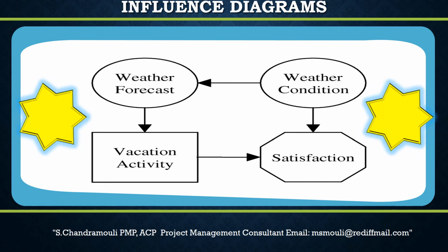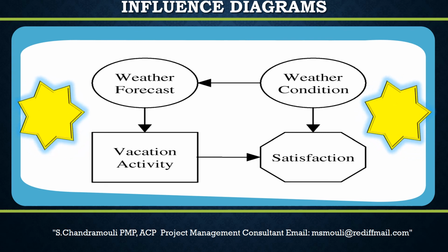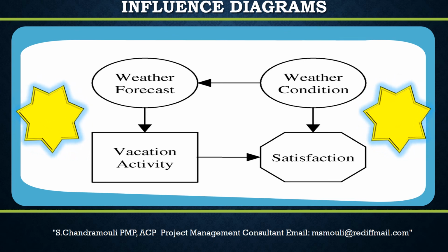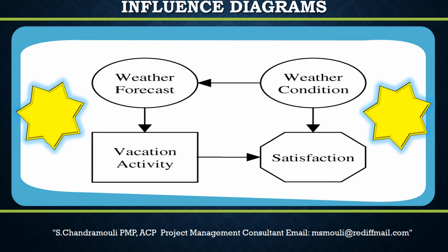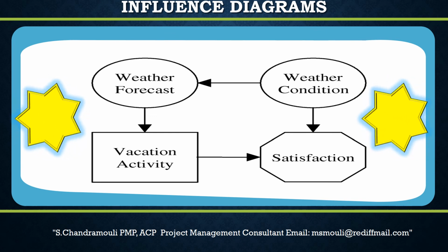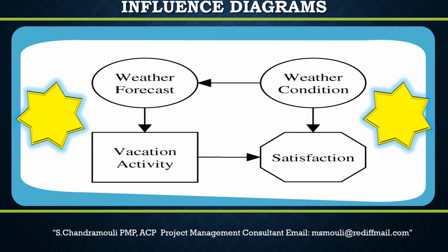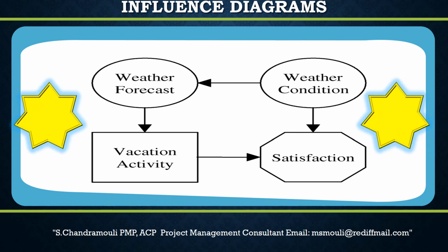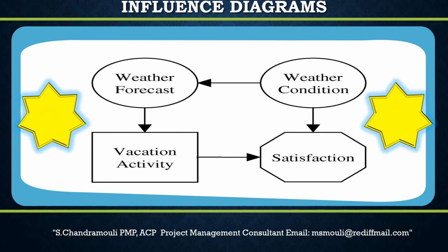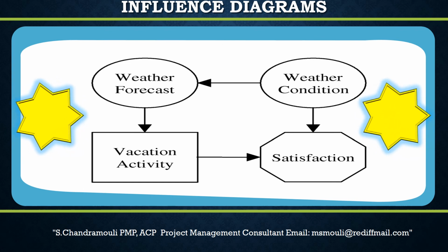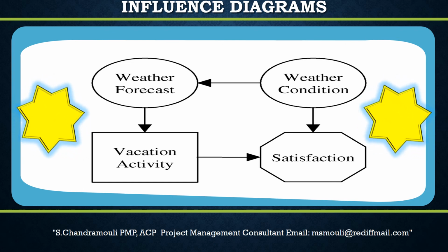What's the outcome? 3. Final valuation. How do we like it? The influence diagram is then evaluated using a simulation technique, such as Monte Carlo analysis, to indicate which elements have the greatest influence on key outcomes. Outputs from an influence diagram are similar to other quantitative risk analysis methods, including S-curves and tornado diagrams.